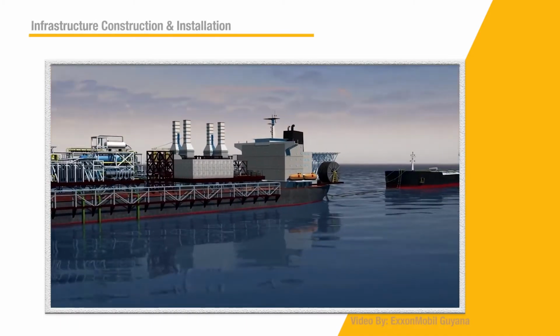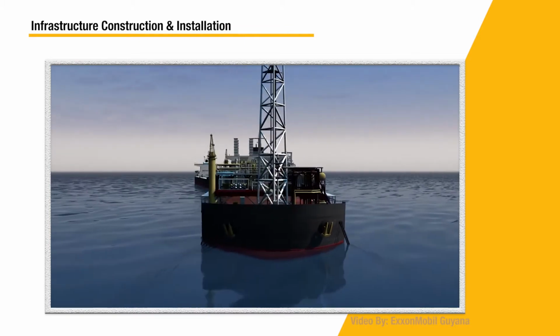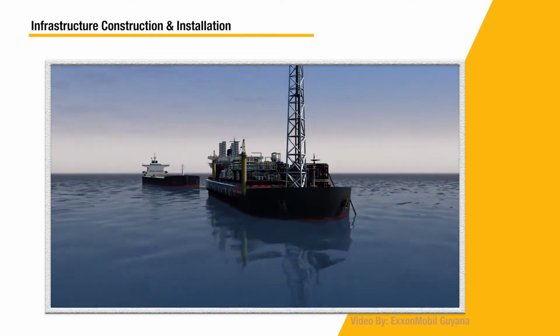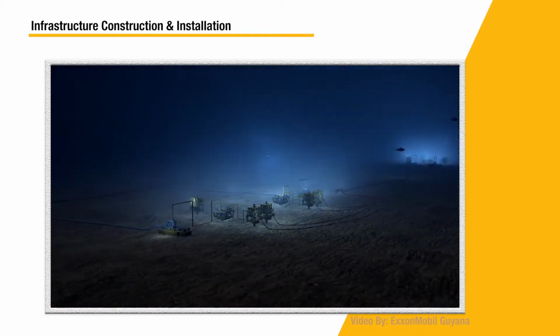During the development phase, the production infrastructure and facilities are built and installed. These activities involve significant engineering, fabrication, and logistics, requiring thousands of man-hours and thousands of tons of steel. Deep offshore infrastructure mainly comprises the surface facilities such as floating production units and the subsurface infrastructure such as subsea systems.